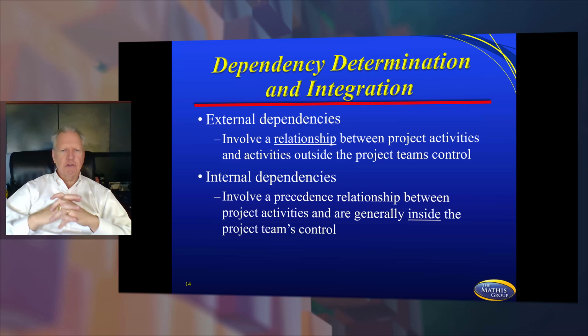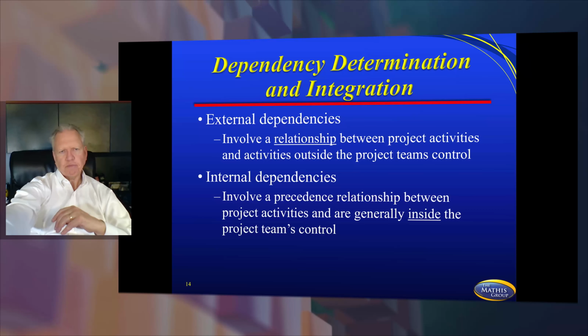Some will have external dependencies. Those of you who have done construction projects, you have to get your permits, you have to have walkthroughs, not only with the customer, but with the bank or with all the inspectors. That's an external dependency that you would have.